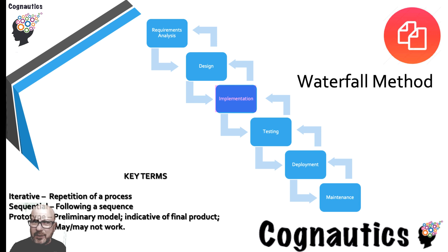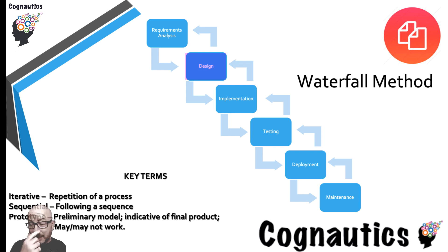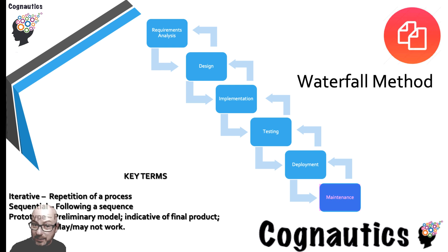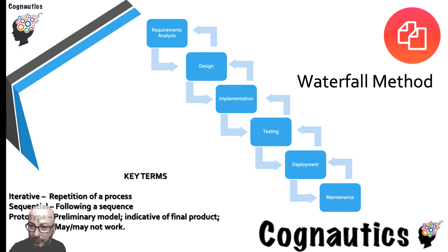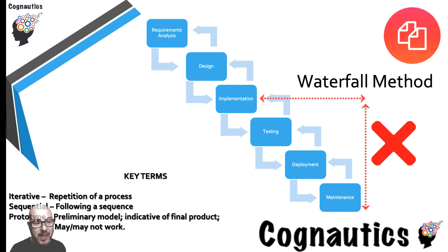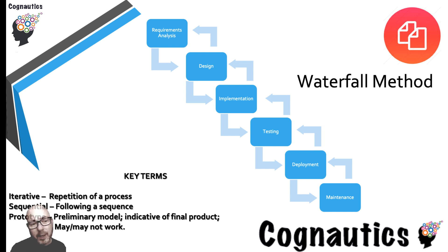Let's say the design stage works well, but then at the implementation stage you run into problems — perhaps the software you wanted to use can't do what's needed and costs start to spiral out of control. In that case you'd go back to the design phase and make changes, which might also involve going back up to requirements analysis. From there you'd go back down: design, implementation, testing, deployment, maintenance. The rule is you can go back up as many steps as you like, but coming back down you cannot miss any stages.